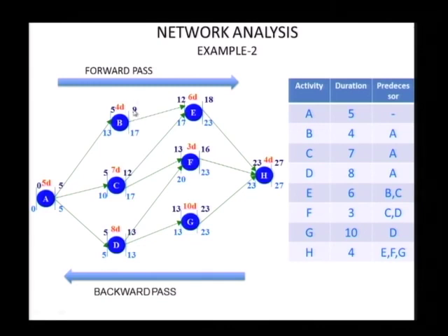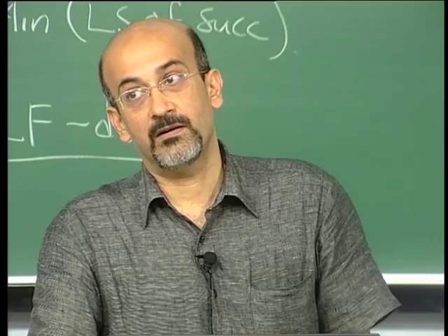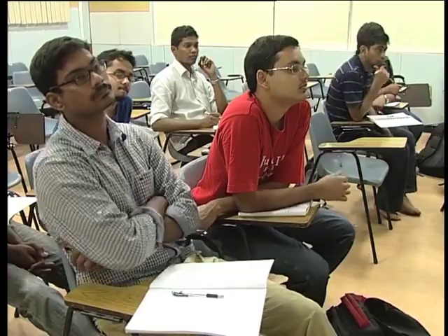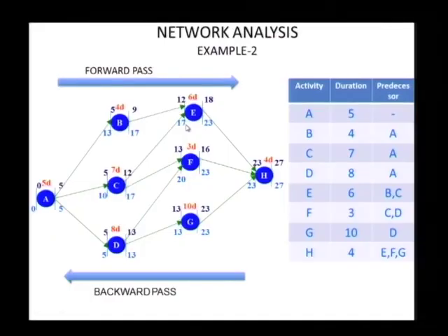If I am going with my early finish, it is 9, and the late start is 12. So I can go 3 days from the early parameters of B without delaying E. If I go to the 4th day, E will start getting impacted, unless I of course move E all the way to start at 17.